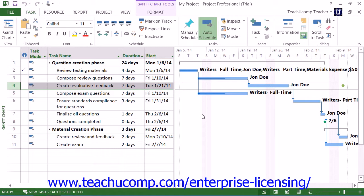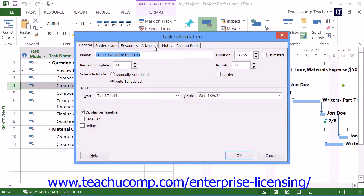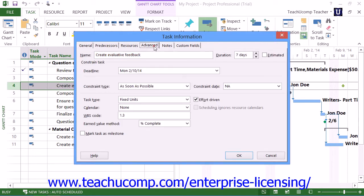To set a deadline date for a task, select the task and open the Task Information Dialog box, and then click the Advanced tab within the Task Information Dialog box. You then select the desired deadline date from the Deadline drop-down. Finally, click the OK button to set the deadline date for the task.